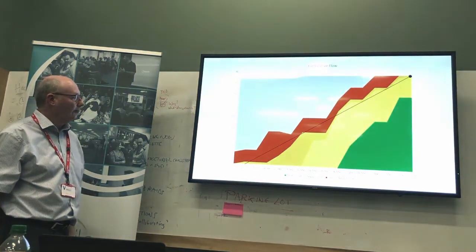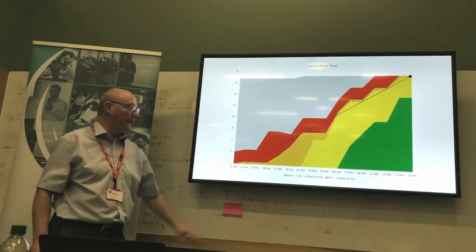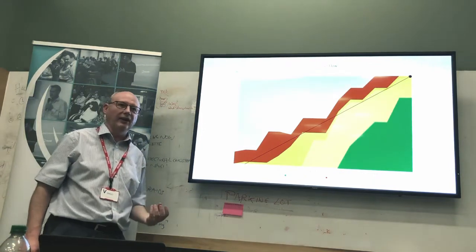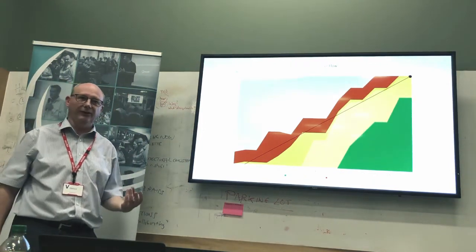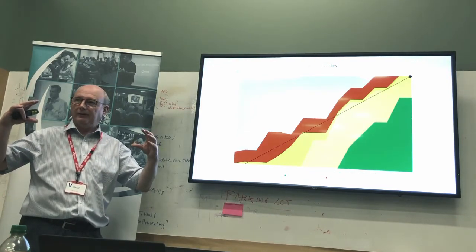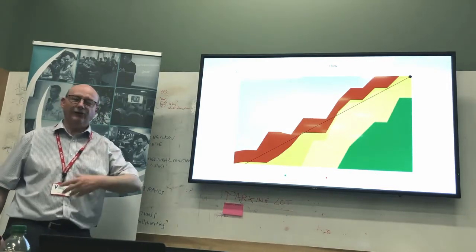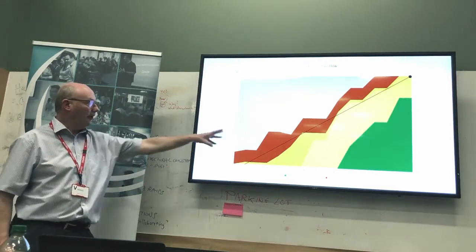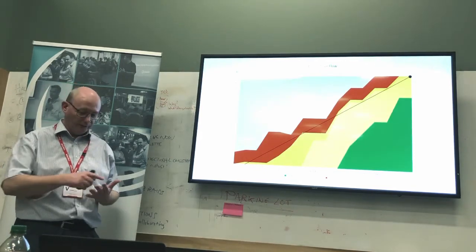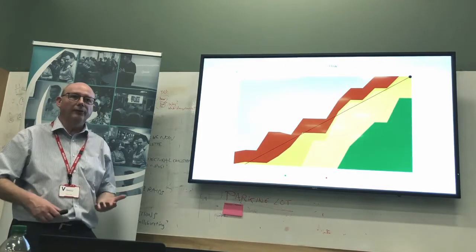Yeah, that's right. Another thing I would say that this team was doing at the time they produced this cumulative flow is their mindset was not about releasing stories, it was about building releases. Those are 2 different ways of looking at the same thing. I would say, I've done this story, can I get that released? These guys are going, well no, release 1.17 has got these stories in it, and until we've got everything ready for that, why would we bother to do a manual regression?